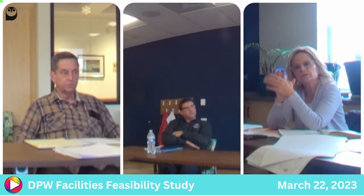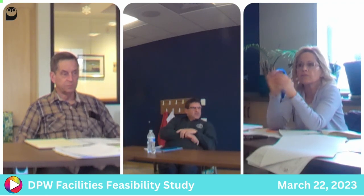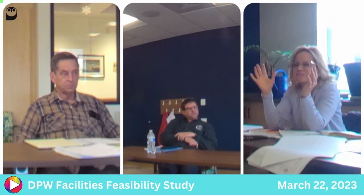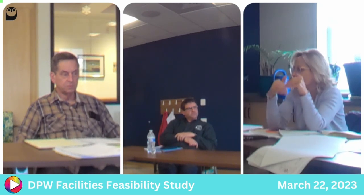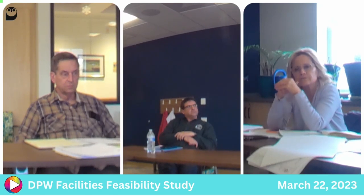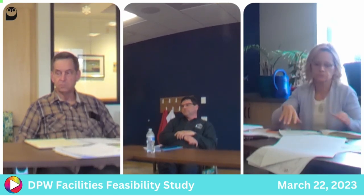On a $27 million building, I'm going to go on the high end, even though I think you guys are still starting to see what you can pick away. My experience is that with the first number, you start to chip away at it and say, what can we live without? But if that were the number, what is the design fee for the architectural? Usually in the range of 10-12% of that. Is that included in that 27? It is, yes.